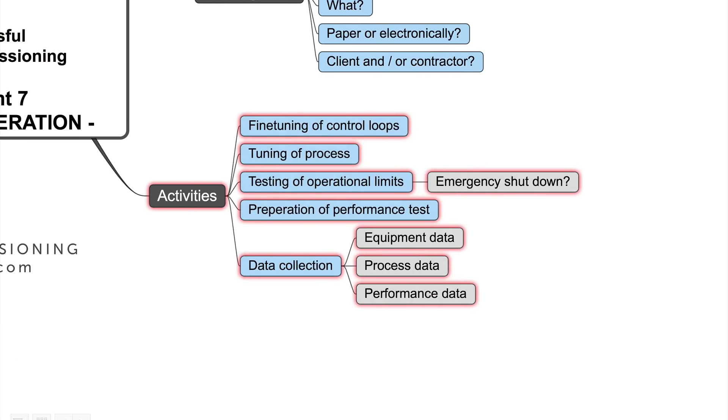Typical activities during initial operation. Most important things is tuning, fine-tuning of control loops, tuning of the complete process. And as well, testing of operational limits. Maybe you will come in such a limit that the emergency shutdown starts. But this is as well a good opportunity to check and observe that the emergency shutdown is working well.